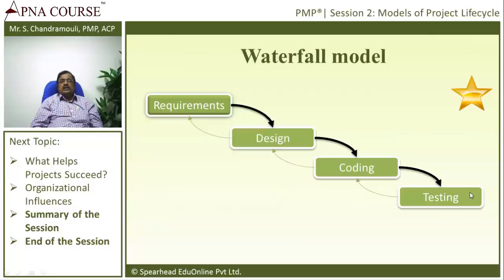The Waterfall Model is simple — everybody knows about it. There are a lot of advantages: it is very simple to follow. However, it is also very difficult in certain situations. For example, if in the design phase the customer is asking for a change in requirements, you cannot go back. You need to completely finish the current phase before starting the next one, so you need to be very careful.